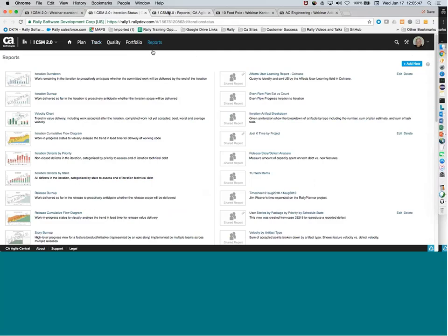Some other things that you can see or pick up from the Burndown, like we have here: right out of the gate, we already have work that's accepted. Well, more than likely that was probably carried over from a previous sprint. So we'd like to understand why we're carrying that over, and hopefully this is more of an exception than the rule.